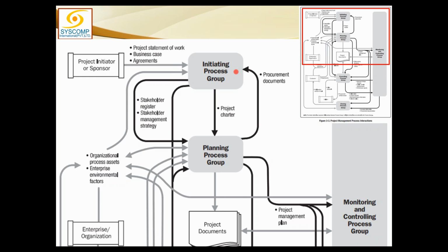So in initiation, the sponsor will create the charter. In some of the cases, it is assumed or thought that the charter is developed by the project manager, which is a wrong statement. This is not the responsibility of the project manager to create the charter. This is the responsibility of the project sponsor.